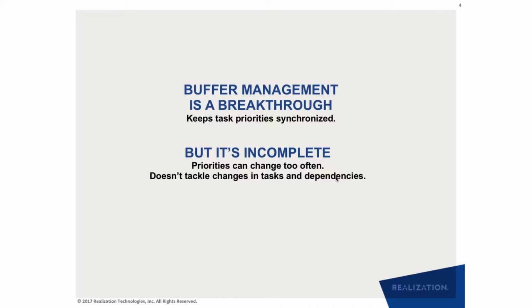And with that, buffer management is not enough to keep the plan alive. Now you have to go into this constant planning and replanning mode, which again renders the plan useless. So even if you have buffer management running, but if you have to change your project plan every day or every 2 days or even every week, then it becomes a useless tool and people put it on the side.